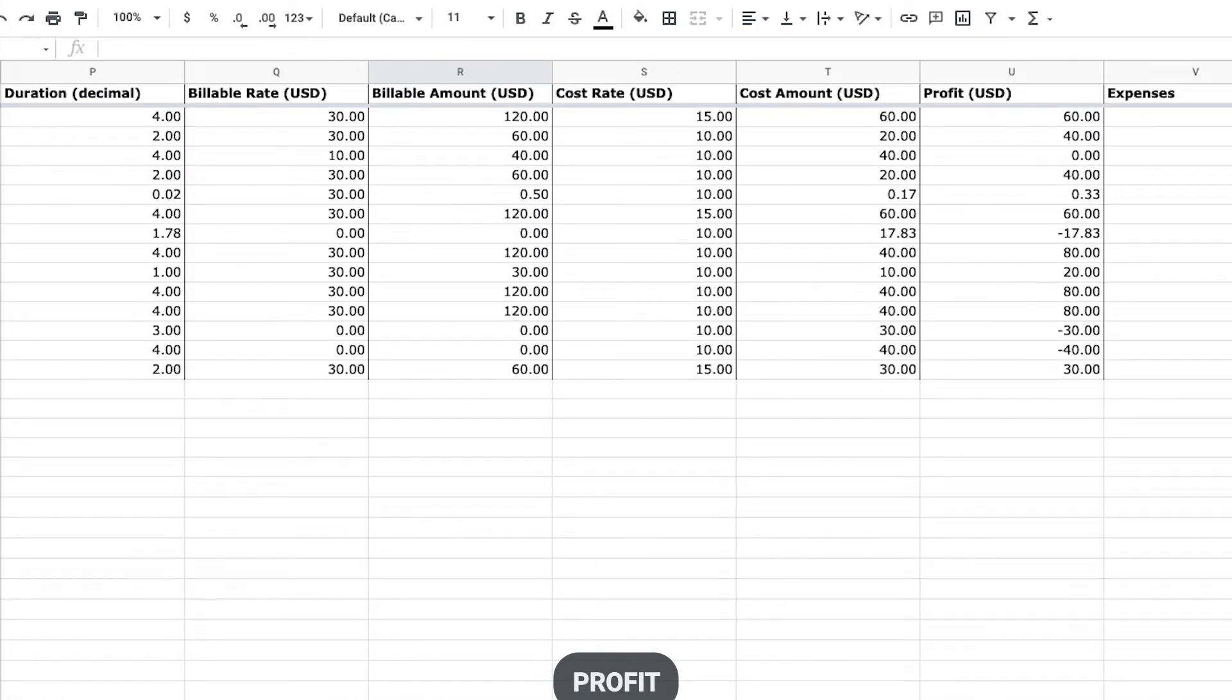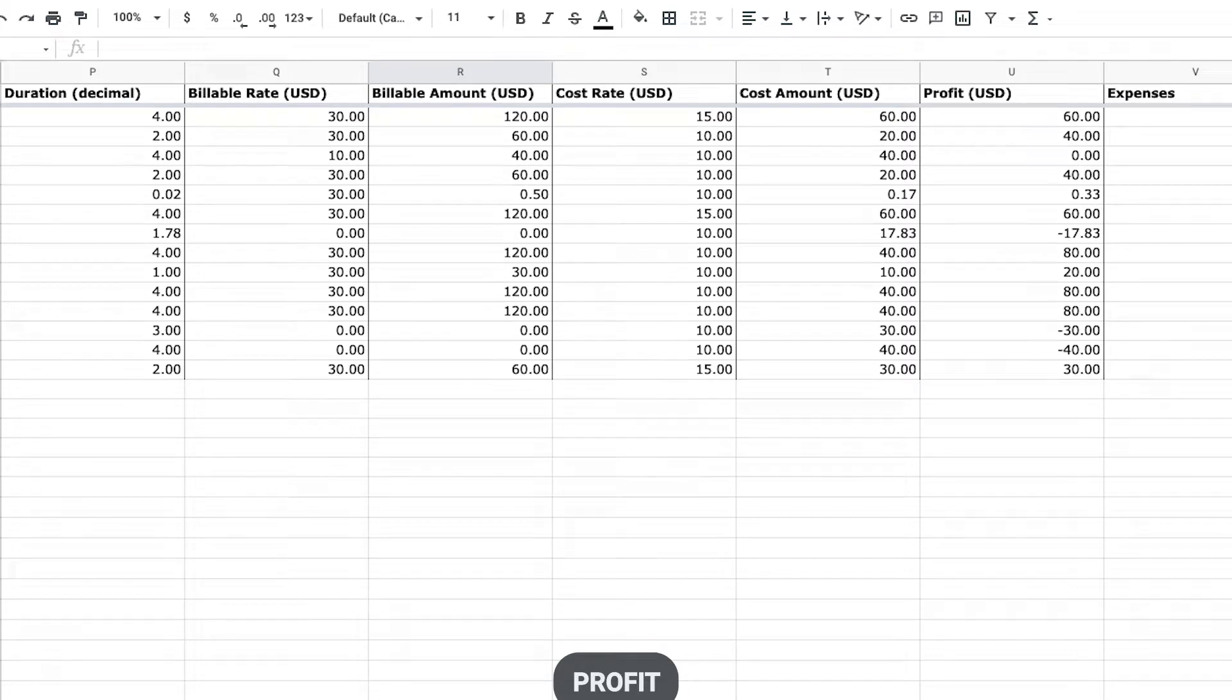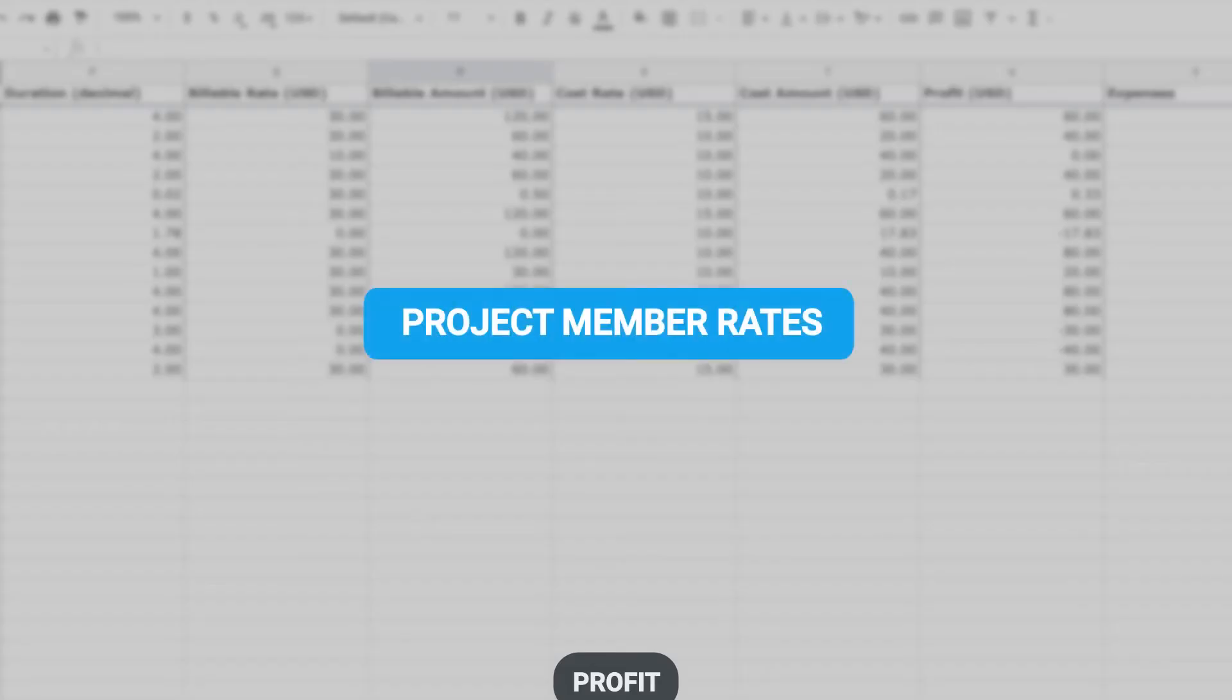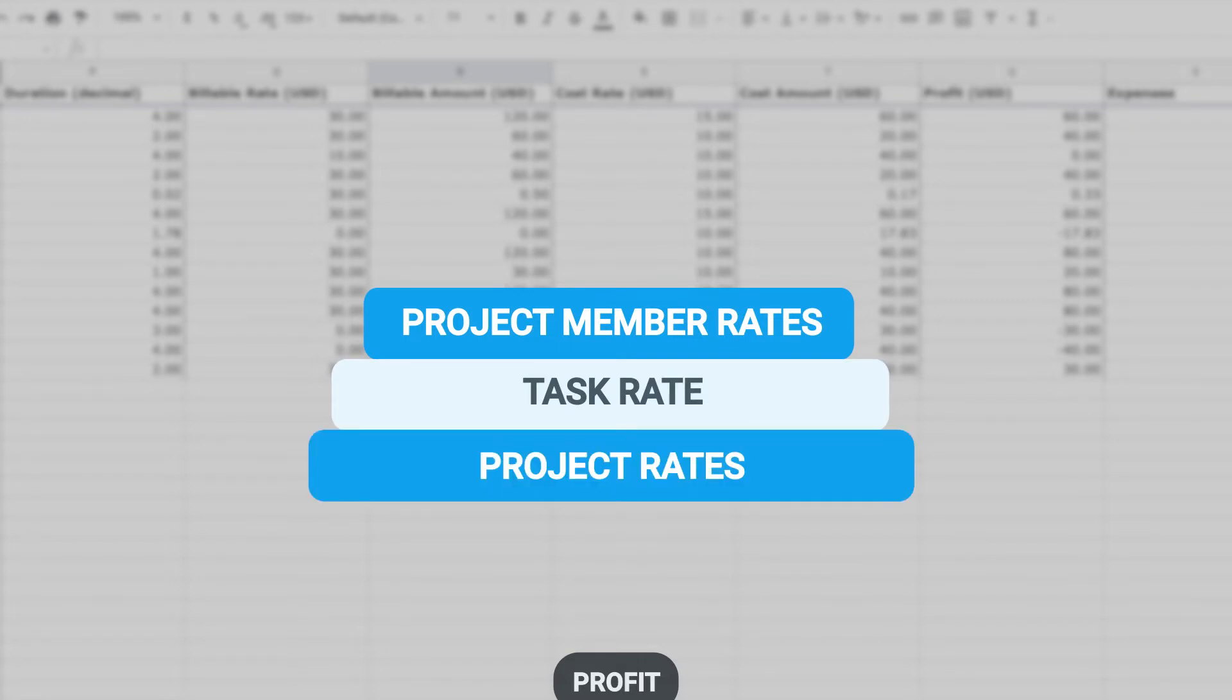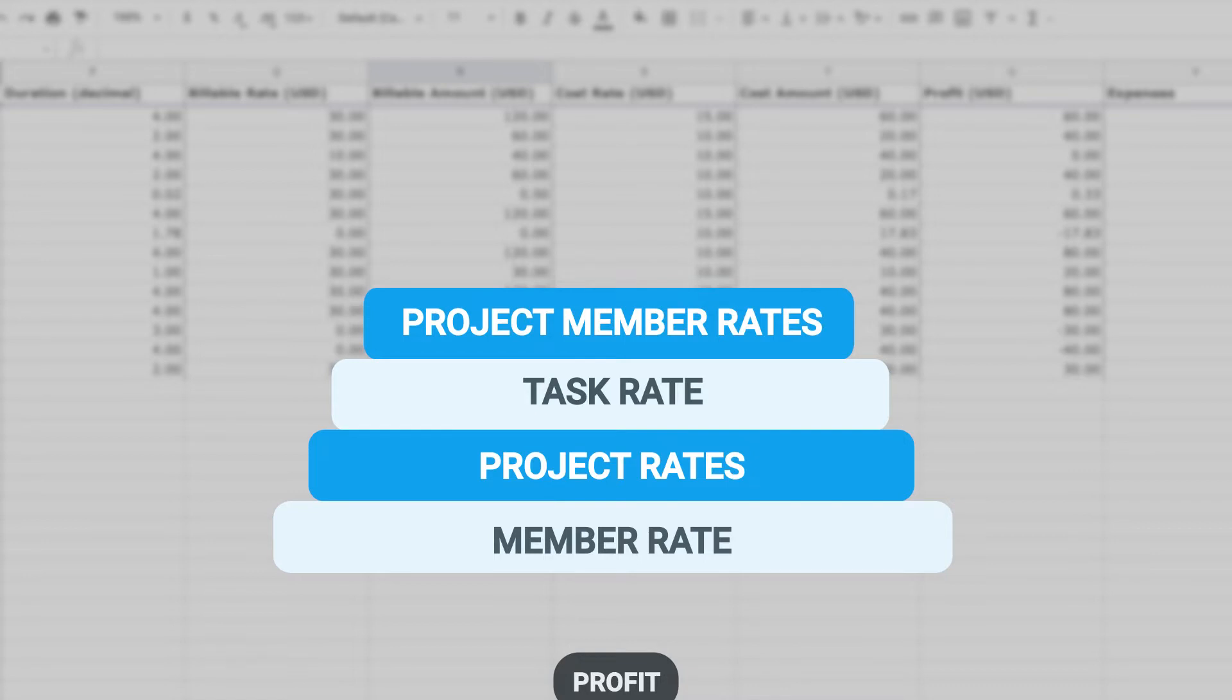Now, as we've covered, there are multiple rates you can set but only one rate is applied. More specific rates override less specific ones. The hierarchy goes like this. Project member rates override task rate, which overrides project rate, which overrides member rate, which overrides workspace rate.